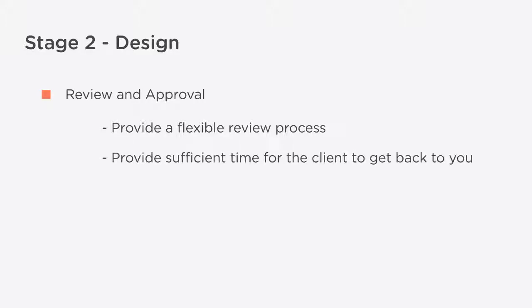Next is review and approval. For both the wireframes and mockups, get the client's approval before you progress. Make the review process as flexible as possible, allowing the client and yourself to tweak the design until both of you are satisfied. Don't be afraid to offer your opinion here. Educate the client on your design choices and why your solutions can provide the desired outcomes.